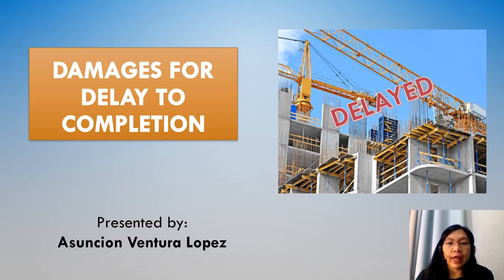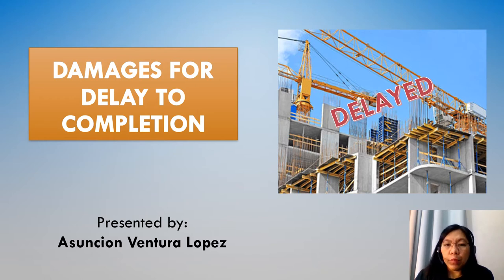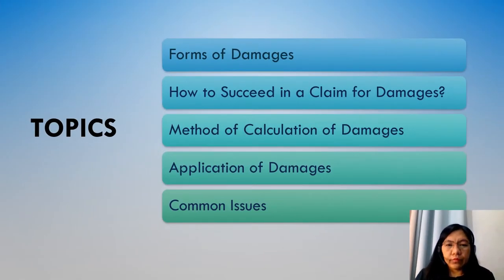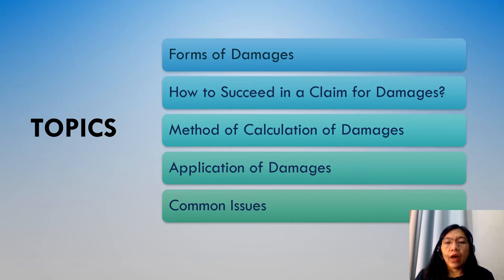In this presentation, we will discuss the damages for delays to completion. Being a planner, the main concern is always the completion of the project as scheduled. However, when there is a delay in the completion of a construction contract for events attributable to the contractor, then the contractor may need to pay for damages for breach of contract. The damages are meant to place the innocent party in the same position as if the contract had been performed without the breach.